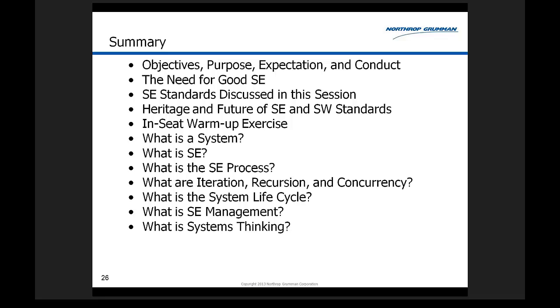Okay, so now you can ask yourself, well, what did I actually spend for those items? And then you can see a cost variance. And then you can ask yourself, well, how many items was I supposed to produce in this period of time? And you can see whether you're ahead or behind schedule in terms of budget. So that's basically earned value, and it's a very effective way of measuring progress and quality of your work.